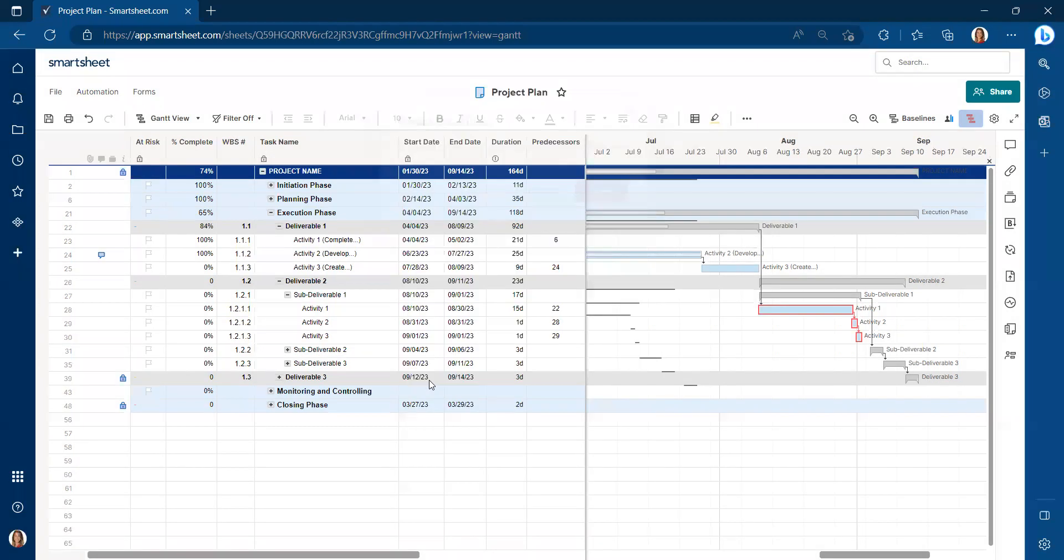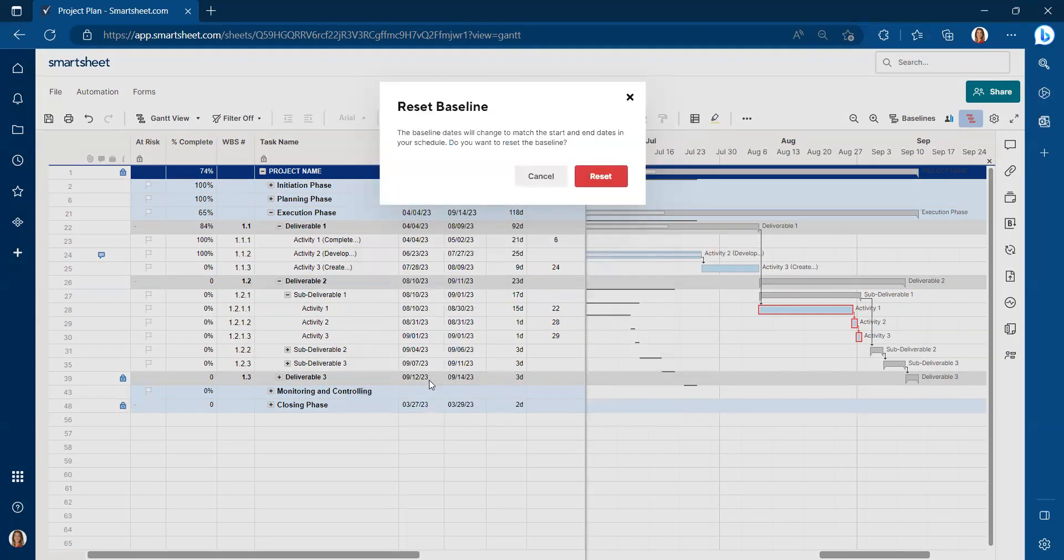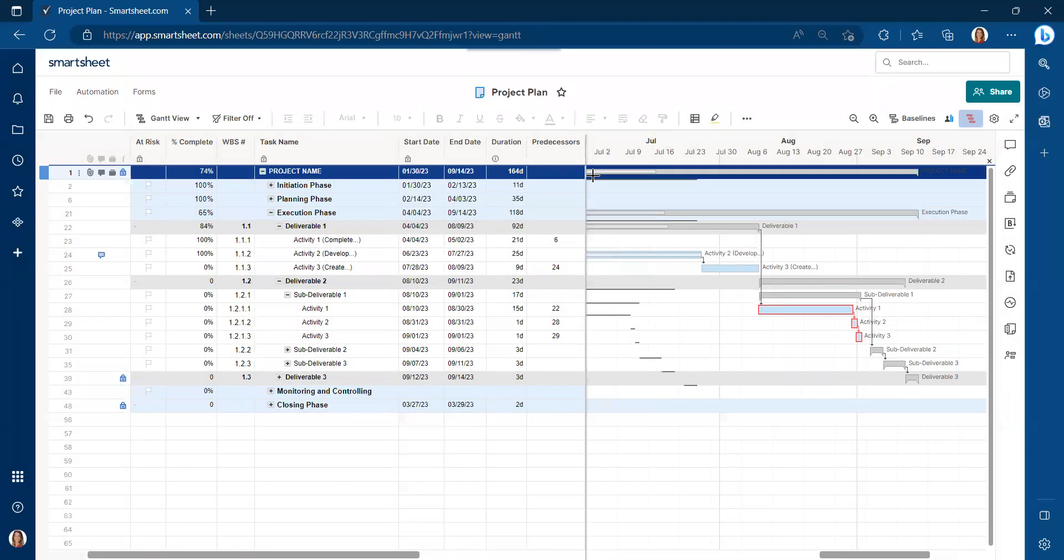And so we implement that change request into our project schedule. And now we want to reset. I clicked the button reset. The baseline dates will change to match the start and end dates in your schedule. Do you want to reset the baseline? Reset.